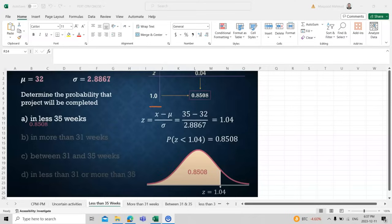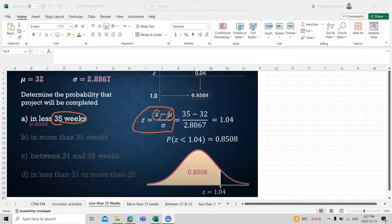The z-score is a value used in statistics that maps to specific probabilities. For example, if the question asks for the probability of completing the project in less than 35 weeks, we substitute x = 35, mu = 32, and sigma = 2.8867 into the formula to get the z-score.